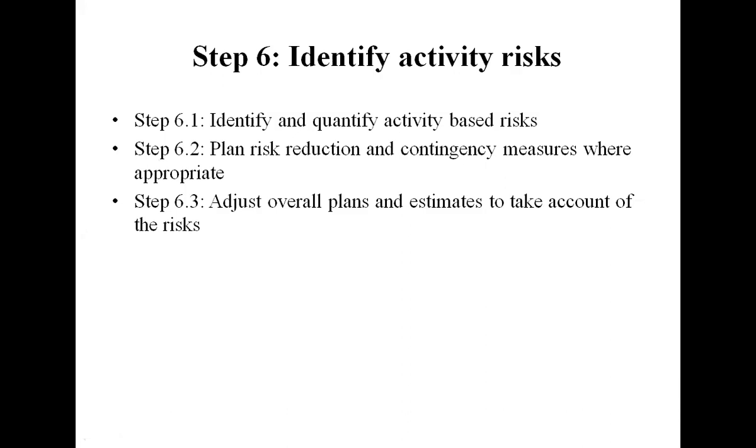So a simple way to handle this is to create a most likely estimation for time or effort. Then create a second estimation with a safety margin, such that the target has a 95% chance of being met.